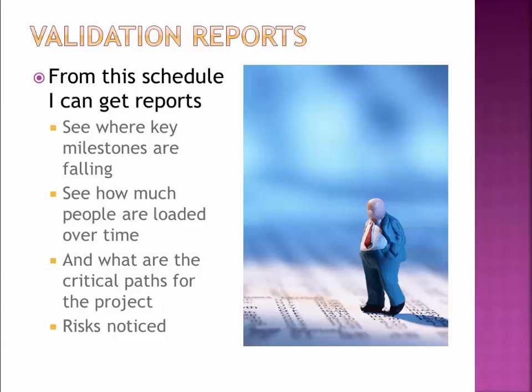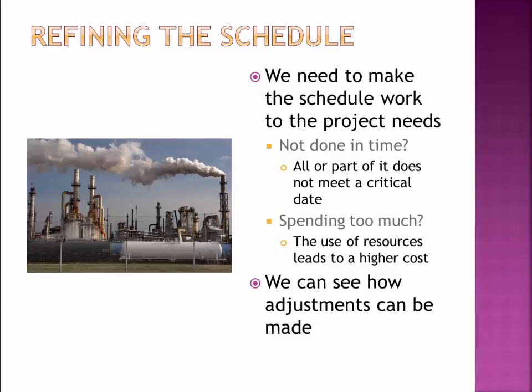So sometimes it's going to help us identify a risk to say, hey, you know what? Every time we go off and test this thing, we end up having to spend 2 days to release the code because it's really, really slow to upload the code to the App Store and download it again. It takes 2 days to get that approved, and now we have to deal with that. Well, that's something you might want to adjust your timelines for. I don't know if that's true or not, just making it up. And that's where we get into refining the schedule.